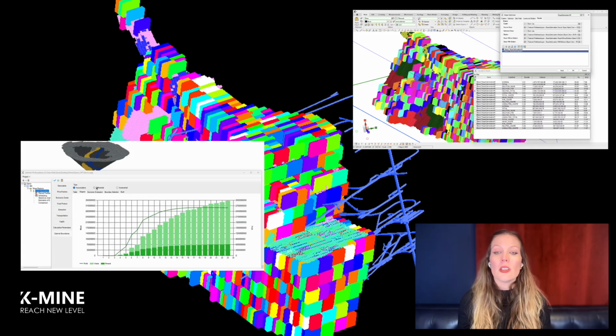The standard tool is year-by-year cash flow modeling. This includes costs for building underground infrastructure, different production rates over time, and varying costs of open pit versus underground mining. The end goal is, of course, maximizing the project NPV.